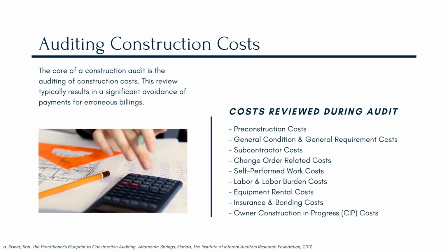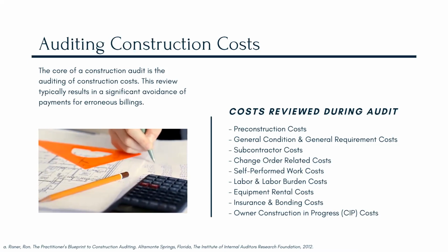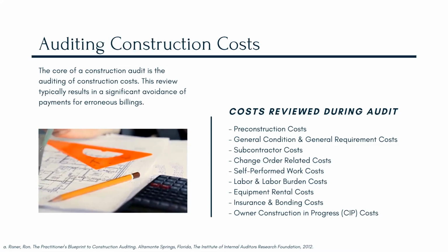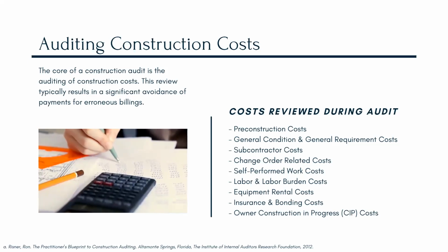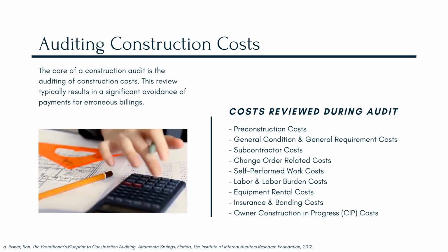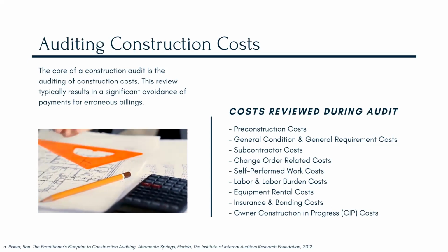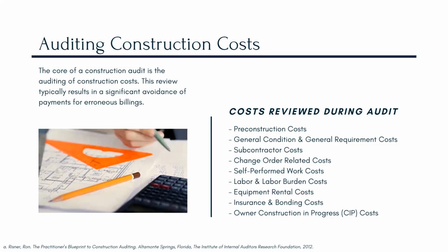One of the more detailed examples is that the state unemployment tax has limits to it. And if you put in the full amount and the project carries on for 12 months, a full year, or multiple years, oftentimes that SUTA amount gets normalized across the entire 12 months, when in fact that cost isn't incurred for some or all of a portion of the construction project itself.